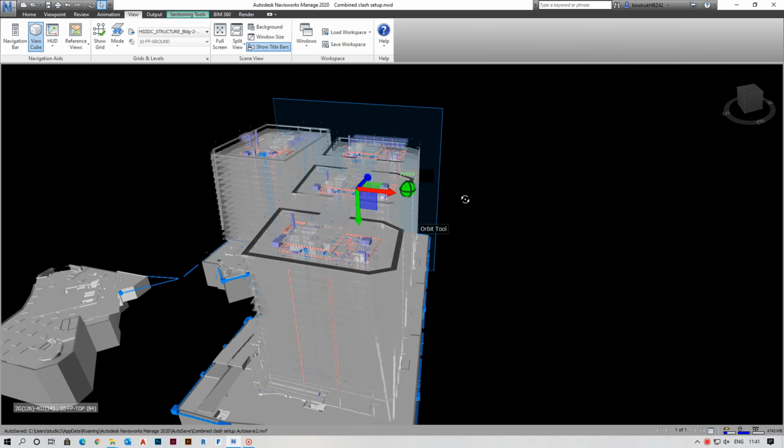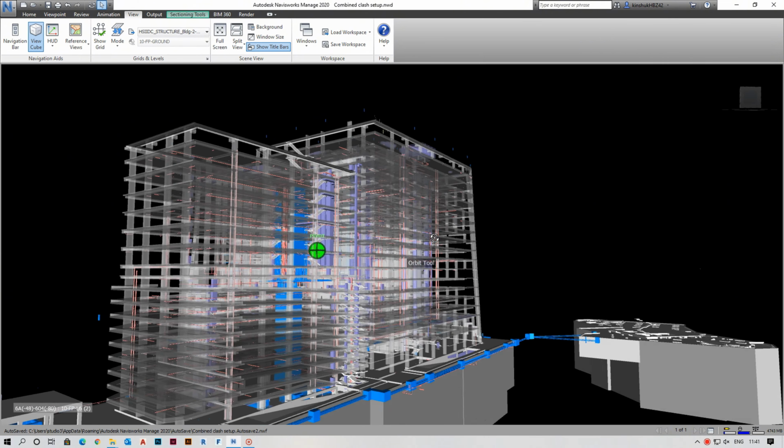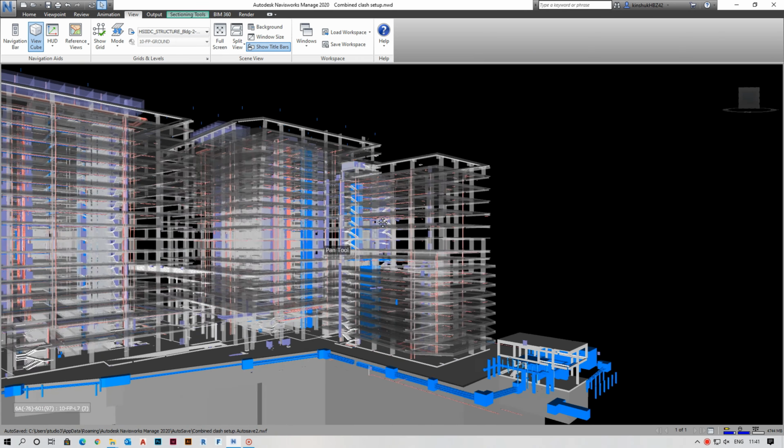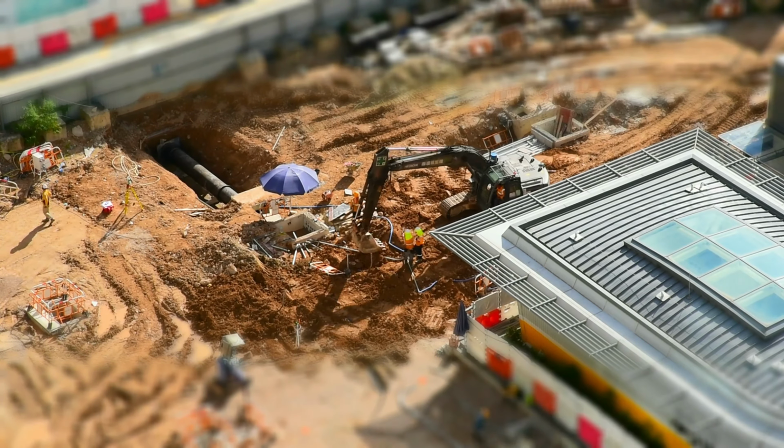Every element in a BIM model, from a wall to a window to a beam to a boiler, isn't just geometry. It's packed with practically usable information. The I in BIM is crucial. We're talking about data like spatial relationships of different components, how they connect and interact in the physical space, material properties of each element, what it is made of, its strength, its fire rating, acoustic values, even vendor information, and so much more. Cost data of materials, and even labor associated with each component, scheduling information of how construction sequencing will unfold over time, where each element sits in the overall schedule of construction of the building, and lifecycle data related to cost management, building operation and maintenance, sustainability metrics such as emissions values, and even eventual demolition or renovation earmarked for each component.